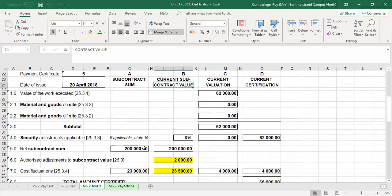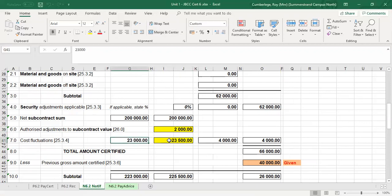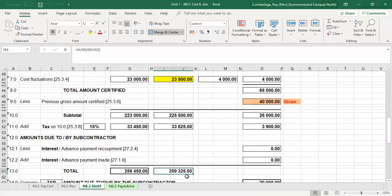For the contract value column for the subcontract, we start with the same net contract sum of 200,000 rand. Note the two changes: we've allowed 2,000 rand for contract instructions numbers 1 and 2 for the nominated subcontractor — meaning we assume there are no other future changes, and only those two contract instructions are known. Because of that small increase, escalation is slightly increased from 23,000 rand to 23,500 rand — an extra 500 rand of escalation on the additional 2,000 rand.